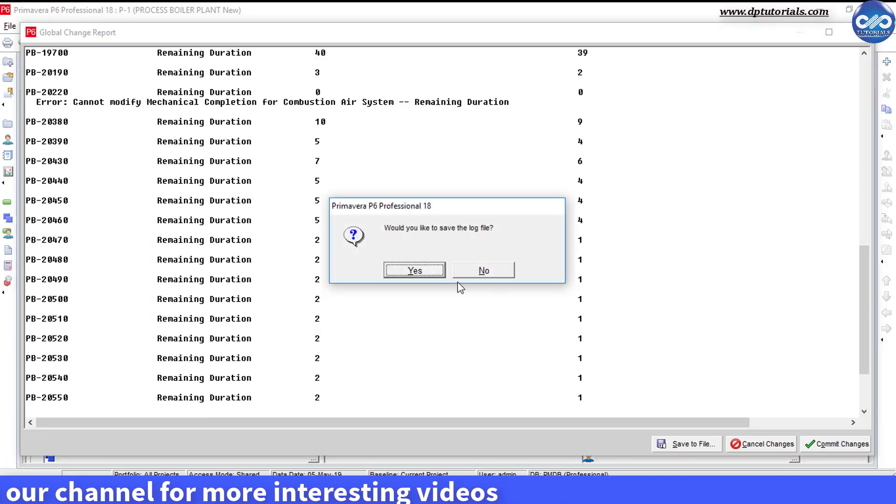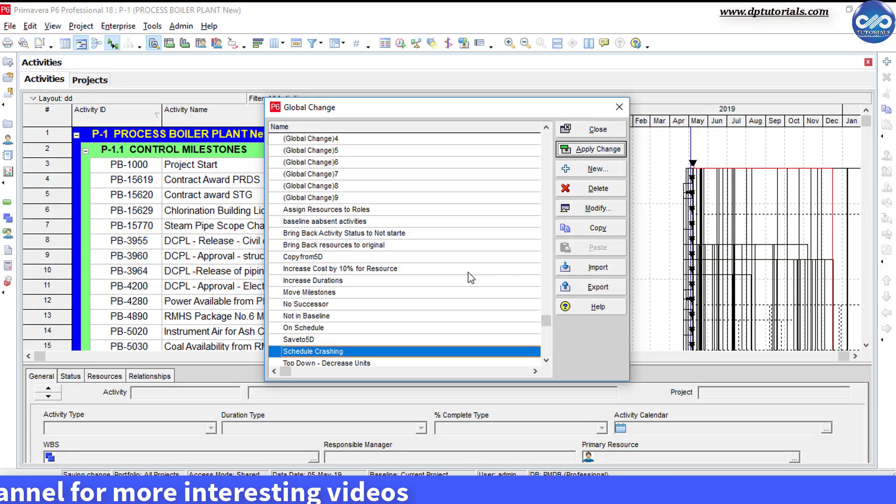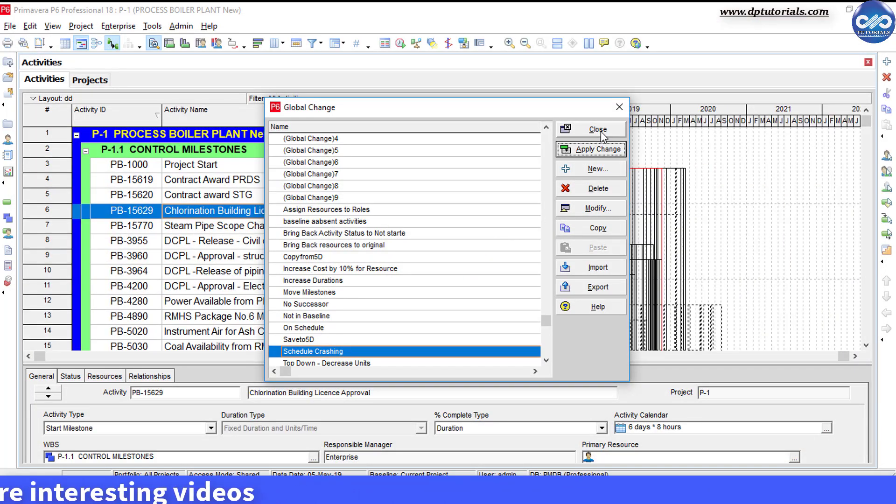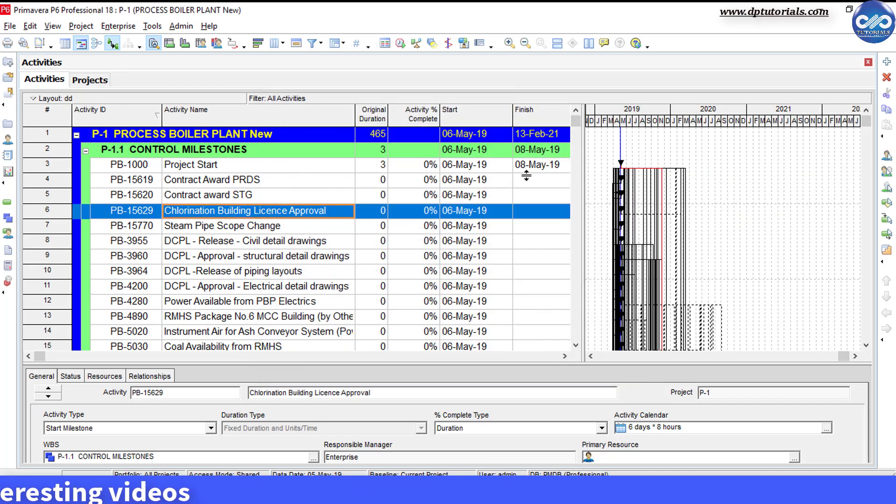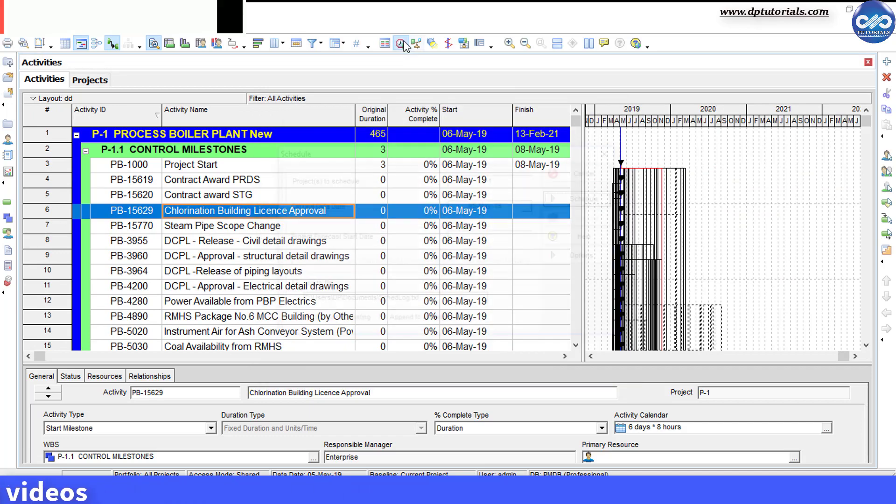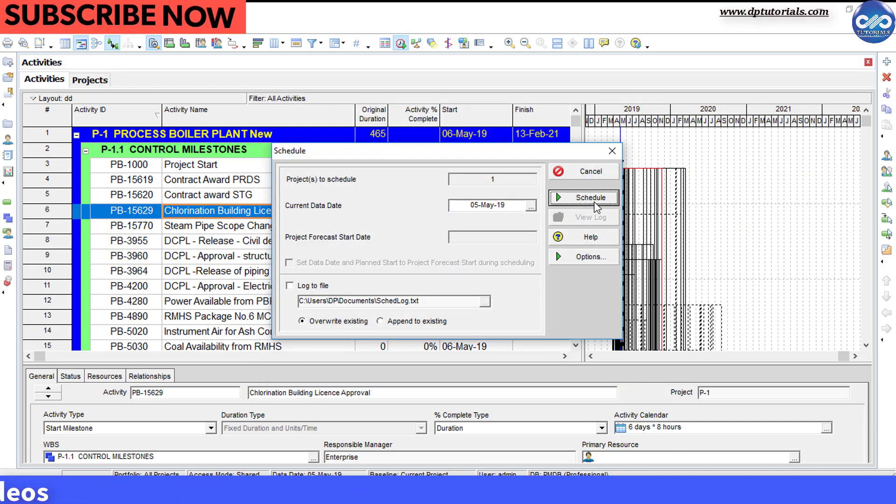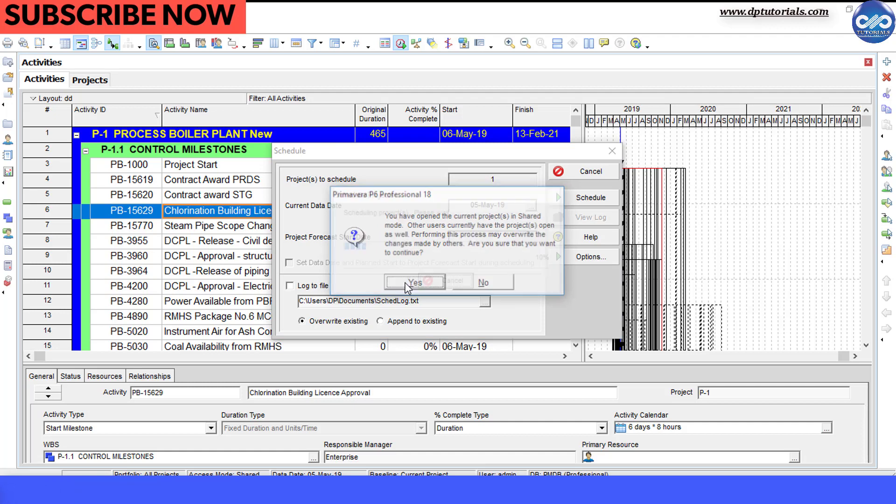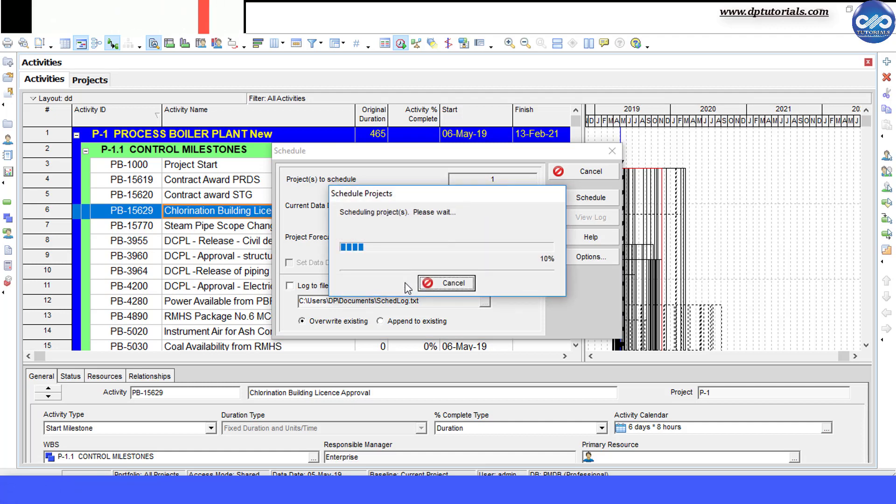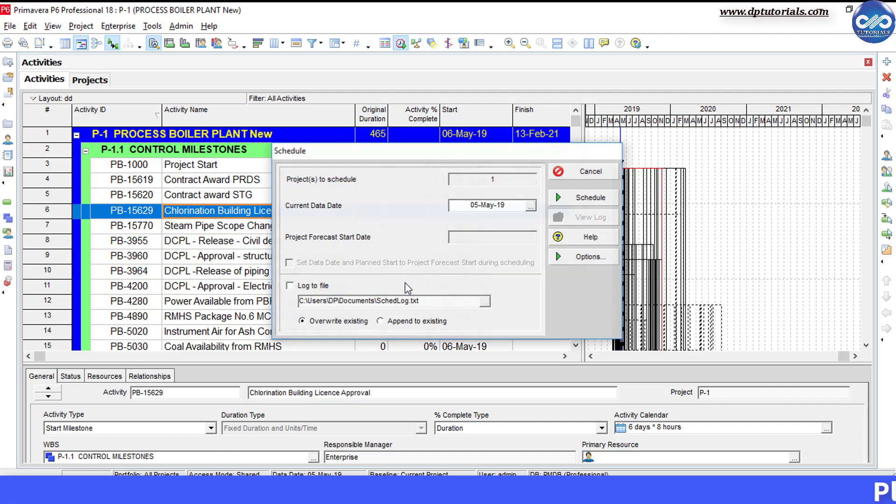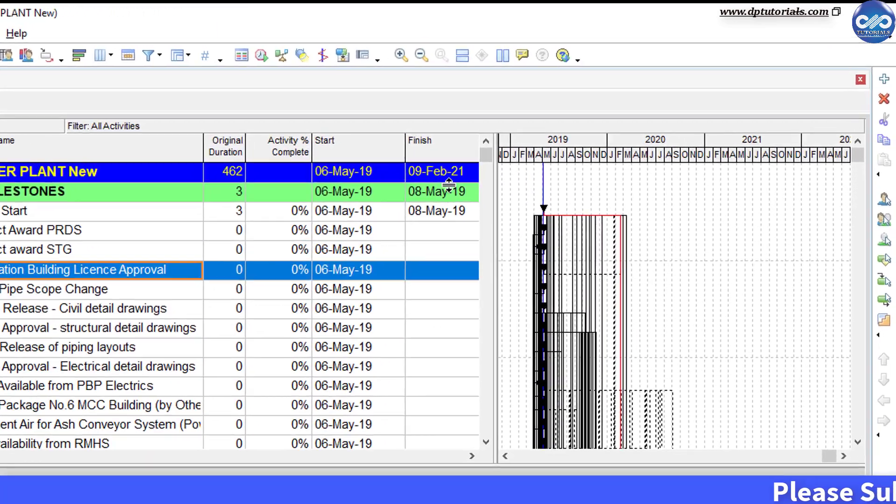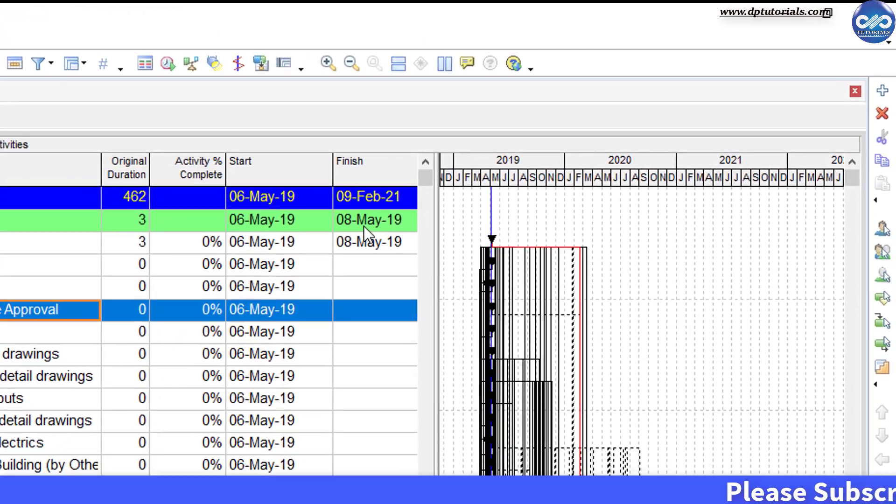Once it is executed, press F9 or click on the schedule button to schedule the project plan. As we have reduced the duration of critical activities by doing this global change, your project duration will also reduce accordingly.